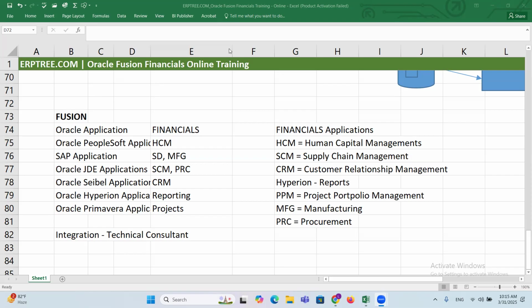We'll have a team as an implementation team. Client side also there will be an implementation team. We are here to help them. They are there to help us because we don't know about their business. Who is the point of contact to us from client side? There'll be a team, there'll be a manager also for the team. If you take a finance team, the typical team size could be the entire finance, there could be 10 members. From the payable side, they may pick 2-3 guys. Receivable side, they may pick 2-3 guys.